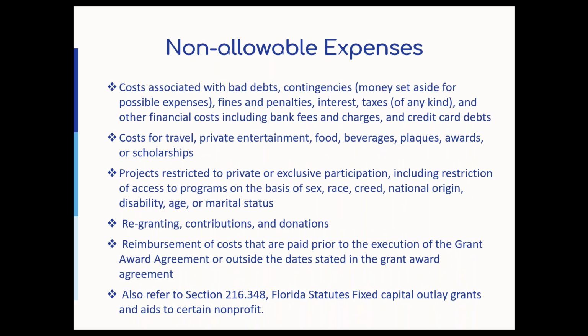Bad debts, travel, food, that kind of thing. Everything has to be open to the public, so no restricted or private or exclusive participation. You can't re-grant the funds. Nothing will be reimbursed that was done before the grant award agreement dates.